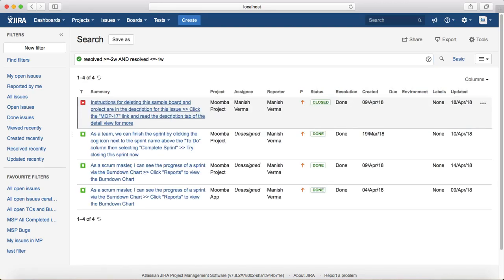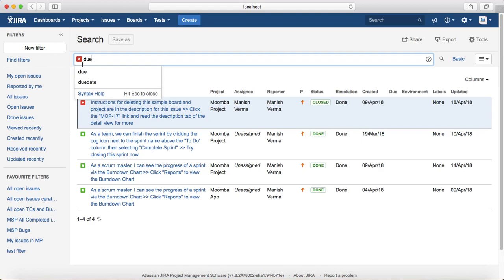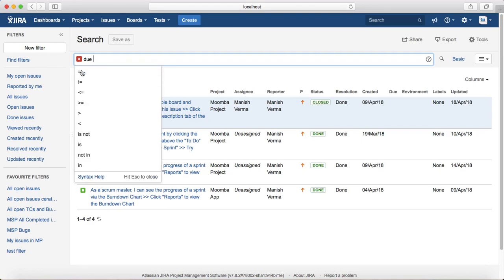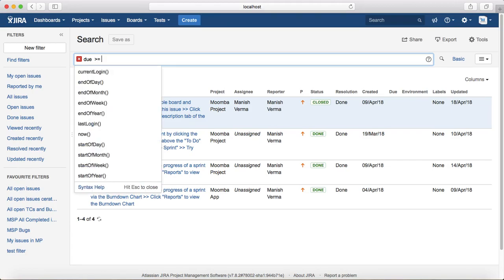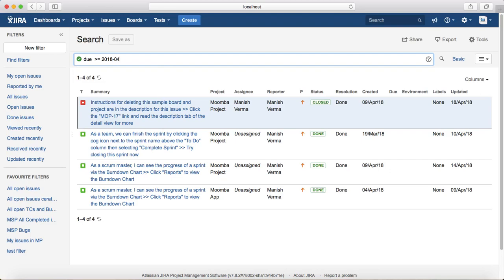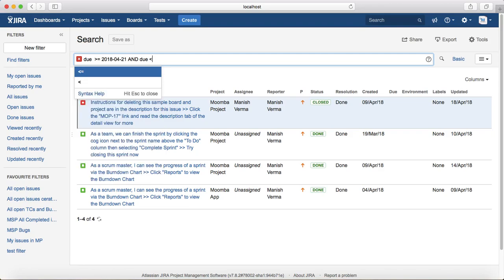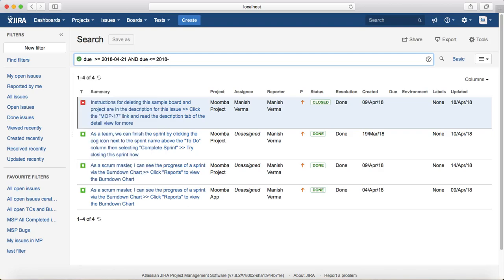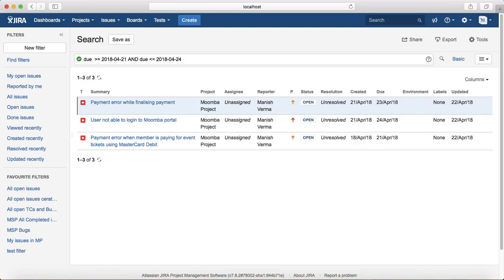Fourth example: you want to see issues due between certain dates, for example between 21st of April and 24th of April 2018. The query is due greater than or equal to 2018-04-21 and due less than or equal to 2018-04-24. This will list the issues that are due between 21st and 24th of April 2018.